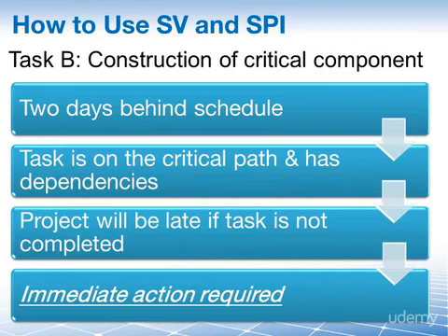And as the project manager, you would need to decide the corrective action required to bring the schedule back into alignment. So, as you can see from these two examples here, while the schedule variance and the schedule performance index are just numbers that are given to you through a calculation, you as the project manager have to look at the individual tasks and say, well, yeah, on task A we're way behind.